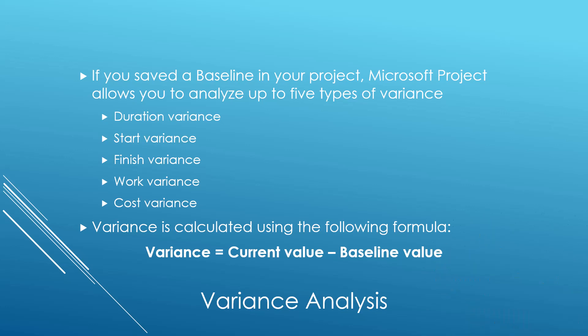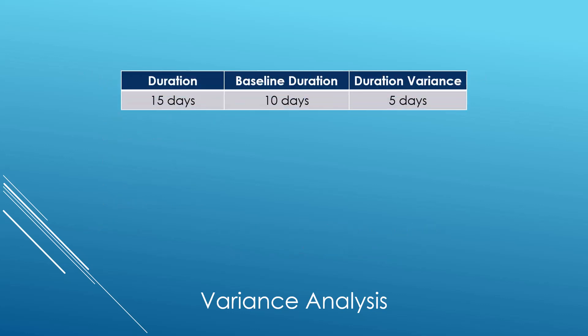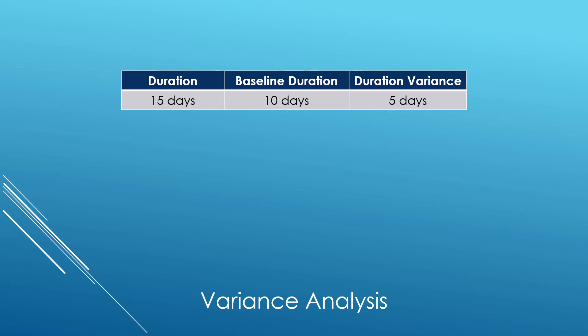Variance is the difference between the current value for the task and its original baseline value. Let me give you a couple of examples. The current duration of a task is 15 days. Its original baseline duration was 10 days. The difference between the two is 5 days, which means that this task's duration is going 5 days longer than planned.